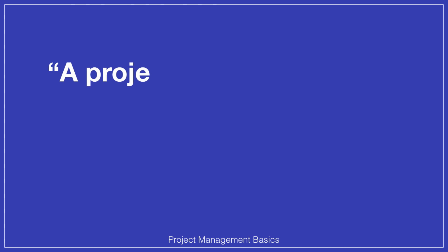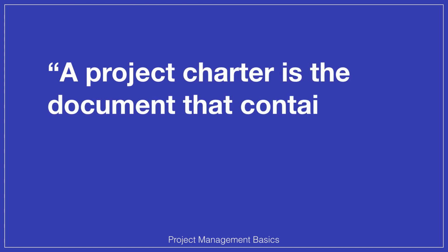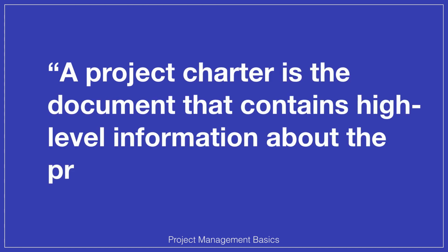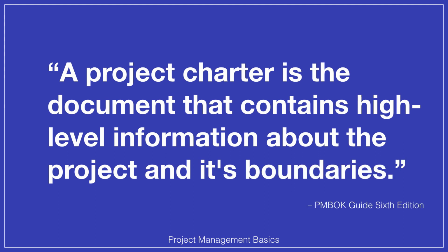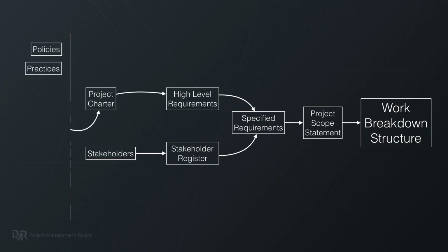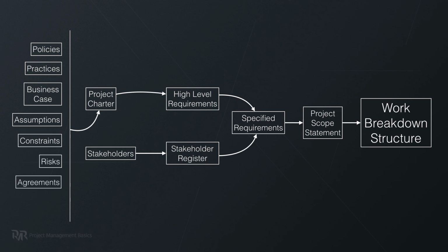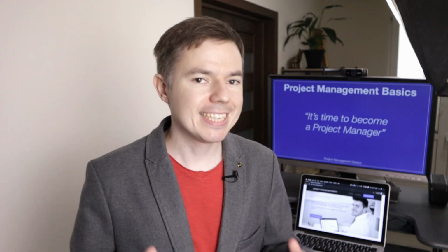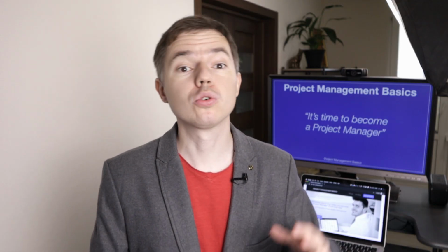A project charter is a document that contains high-level information about the project and its boundaries. Also, it gives an authority to a project manager to spend resources to reach project objectives. At least you need to capture project goal, project business case, high-level requirements, scope, budget, deadline, milestones, assumptions, and risks. Ideally, sponsors or customers should give a sign-off on the project charter.